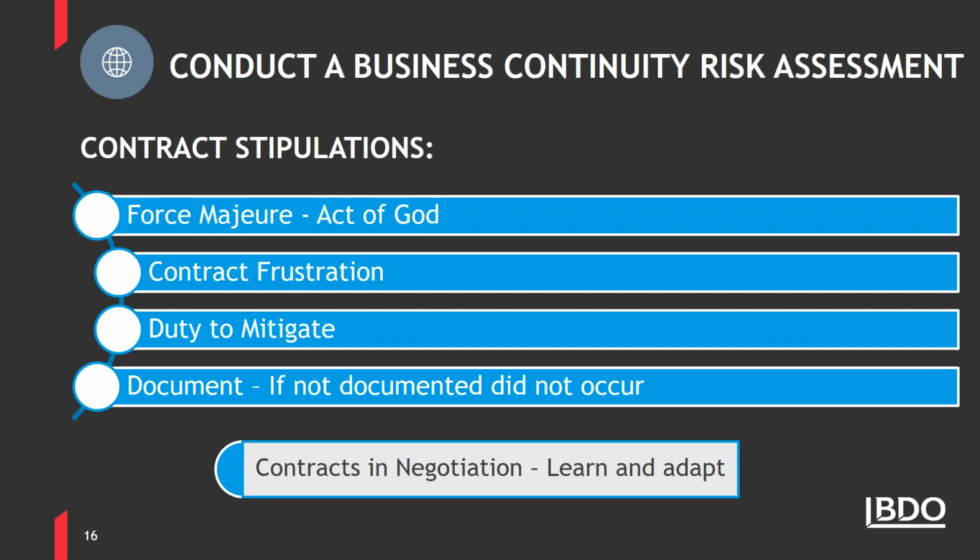With respect to impossibility of performance, one thing to note is economic considerations are generally not a relevant factor, and an alternate method of performance could prevent a party from relying on a force majeure clause, even if it is much more costly. As an example, are the party's employees ill due to the virus and unable to work, or simply afraid to work and choose not to attend?